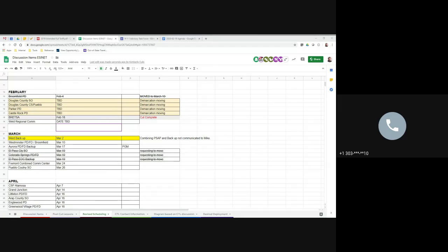We do not, but we have a meeting today with the stakeholders for Douglas County, so we should be able to start getting dates on the calendar. Circuits are installed, and we have approval on the solution that was requested there. So I think we're ready to go ahead and schedule the equipment install and put dates on the calendar.